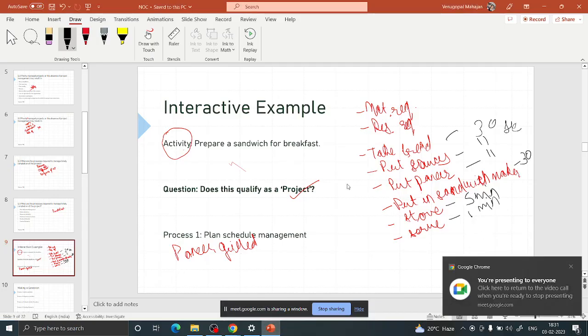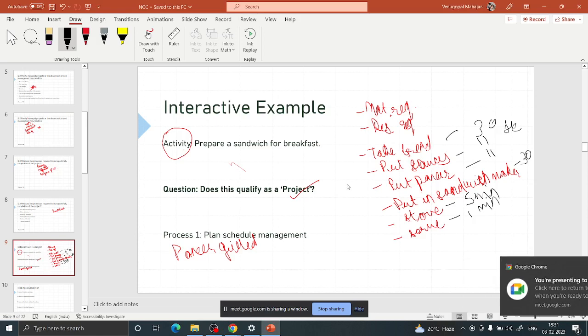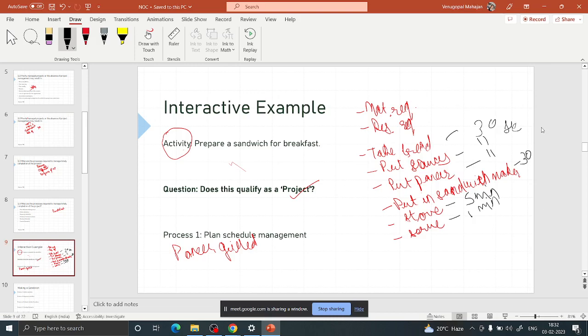Similarly, if you have more than one cook, you can have multiple sandwiches being ready at the same time, with multiple sandwich makers. So you see that once we talk about activities in parallel, the features that come of importance are number of resources, then availability of location.